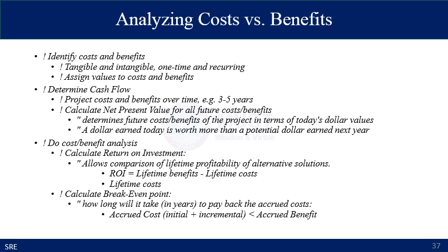A dollar earned today is worth more than the potential dollar earned next year. So you have to ask the question, does cost/benefit analysis produce some positive value? So you have to calculate the return on investment, which allows comparison of lifetime profitability of alternate solutions.